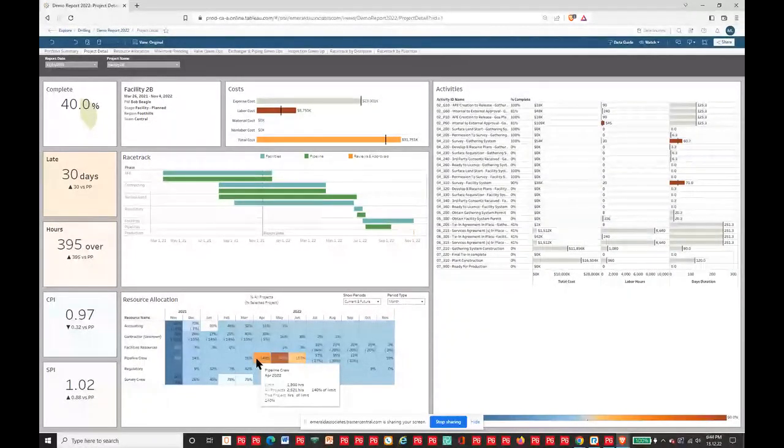So this tells me, depending on what date it is currently, okay, we've got something we need to look into. Again, you've got 247%, you've got 107%. Now, you'll notice there's some blue ones here. Now, if I go into this, you'll notice it says 57%. Well, we're not utilizing all the resources we have available. And the project we're looking at right now is using 17% of the limit. So it's giving you some interesting information on your resource allocation there.